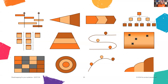Then we have the ambiguous ones. We have a funnel that gets wider as it goes along — the wider end shows optionality, since you're probably not going to have capacity to deliver everything there. Or we have the crawler: anyone who's seen Star Wars will be familiar with the opening crawl where the story goes off into the background. That's a form of roadmap showing things over time. I've seen people use it where the nearest items are 'now' or where the furthest away ones are 'now' — either way can work, since now you have more certainty but less capacity.